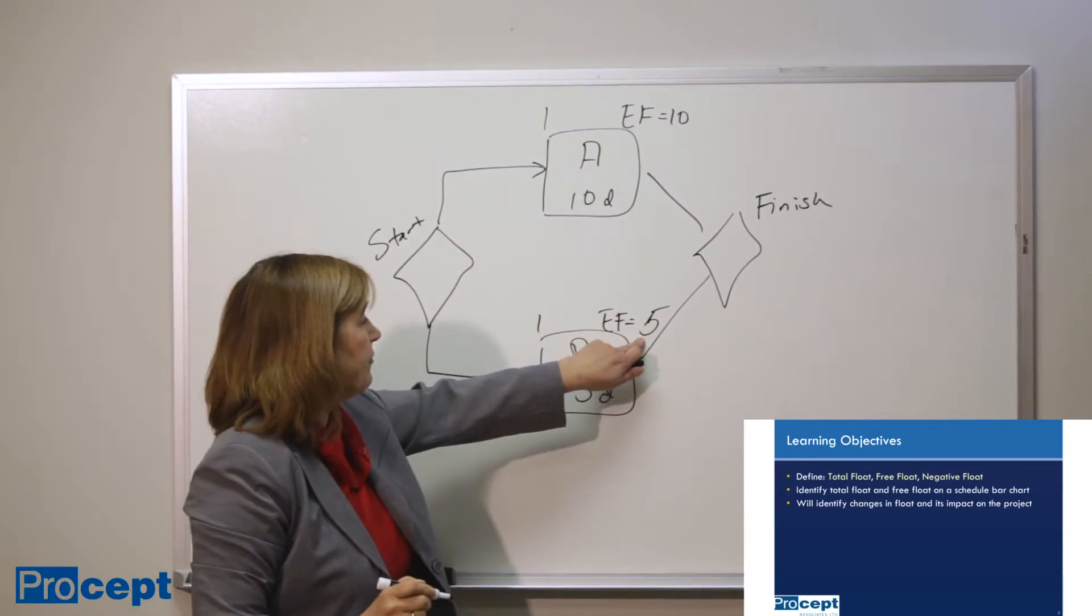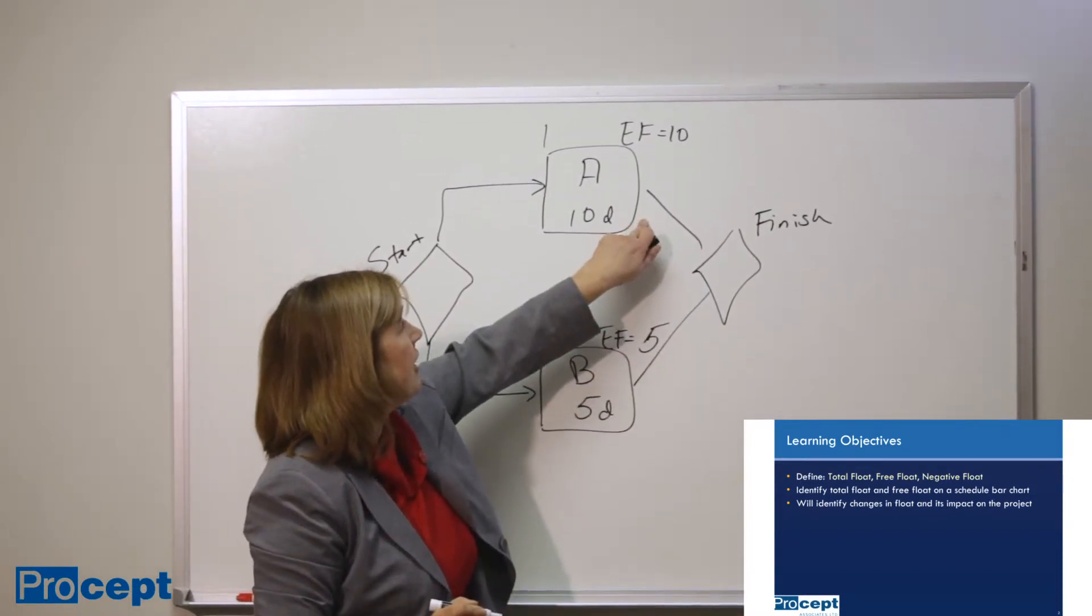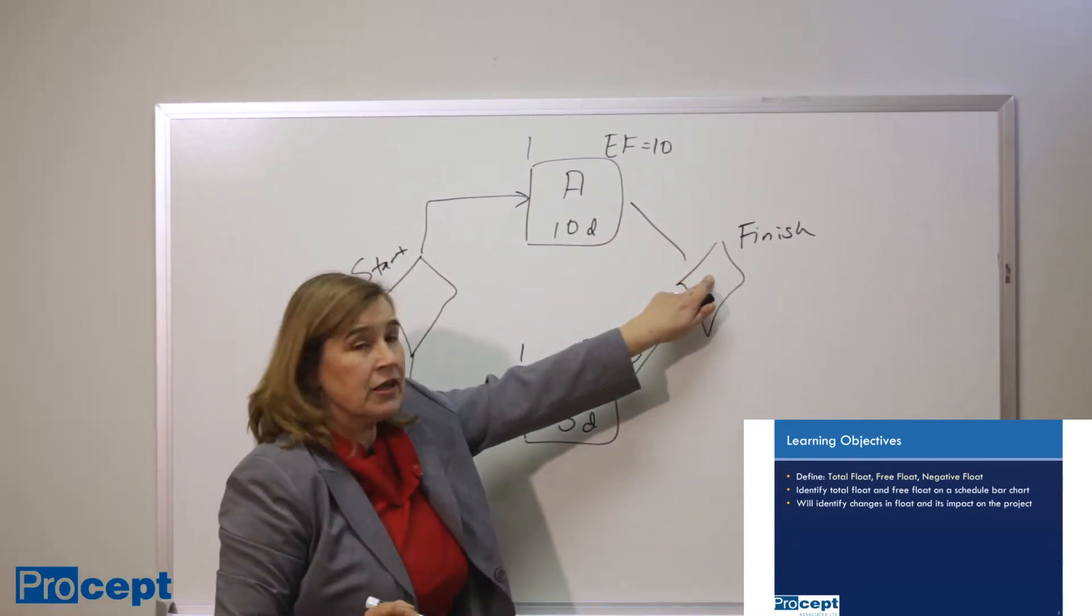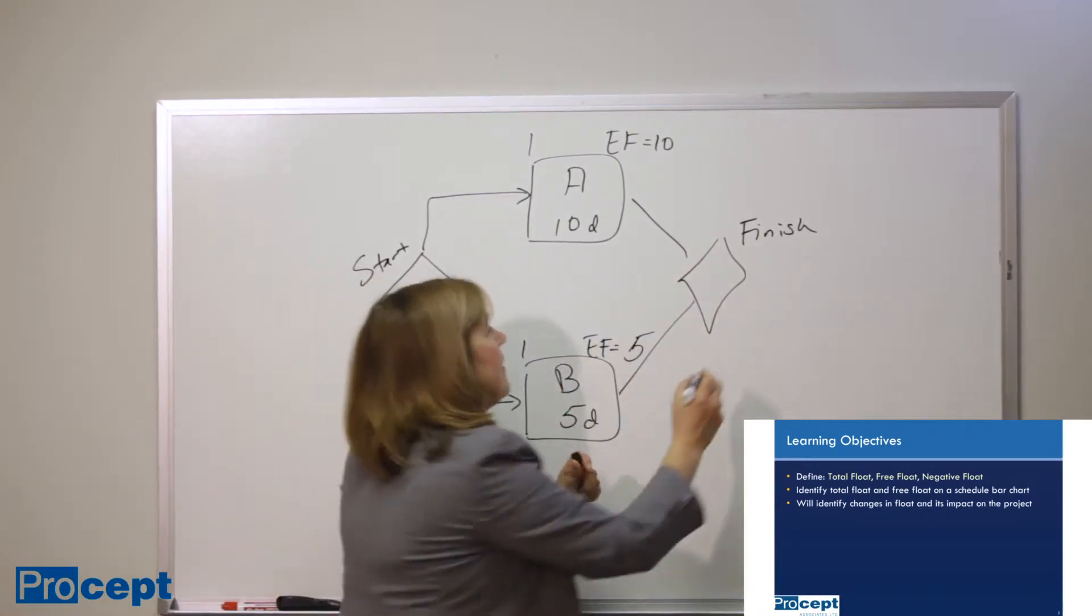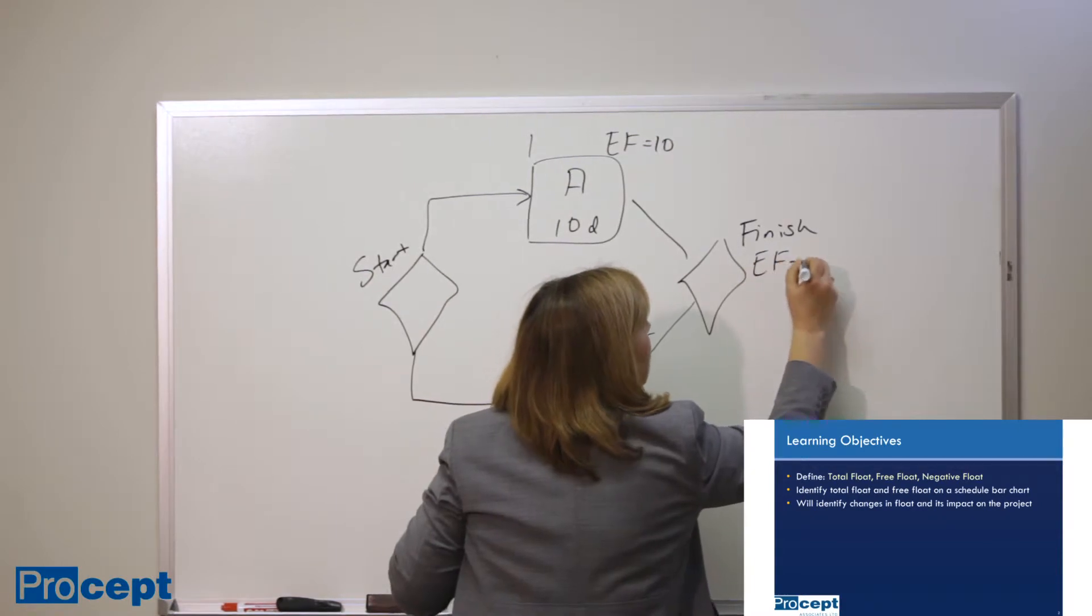So the earliest possible finish time for B is 5, earliest possible finish time for A is 10. The earliest time that this little project can finish is of course day 10.